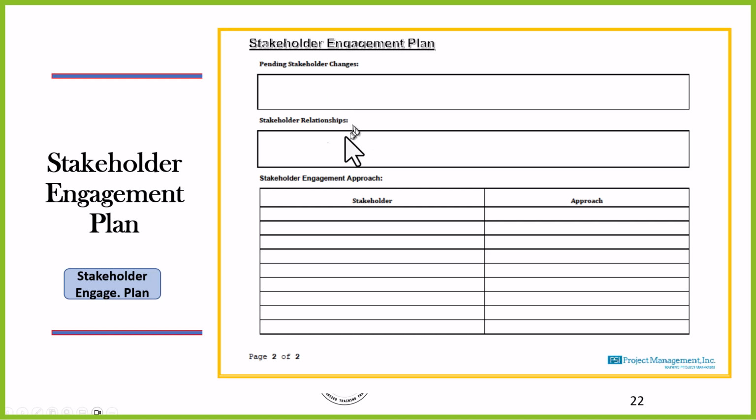So now the stakeholders themselves, I list them name by name. So I should have had Dad, son number 1, and son number 2. Dad, what would be my approach? He's leading. He wants this thing to be done. And so I'm going to certainly communicate with Dad on an ongoing basis and keeping him abreast of what's going on, as well as hyping to him so that he will continue wanting this project.